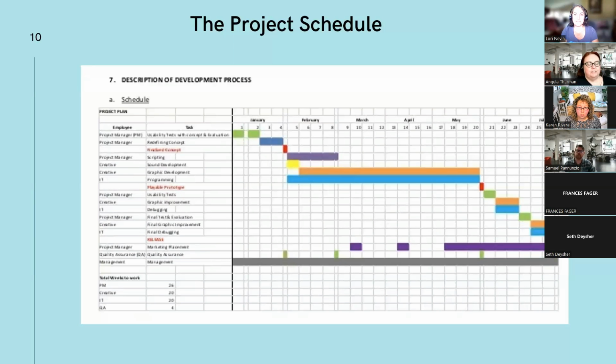You would say, all right, this is the schedule as we originally planned it, but because of the addition of these new requirements, we're proposing and now presenting our updated schedule including those new tasks based on these new requirements. That is something you may see, and it's completely acceptable to revise your schedule in that case.